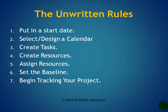Step two, select your project calendar, either from an existing list of calendars in the change working time window, or design a brand new calendar specific to your company, organization, or project's needs.